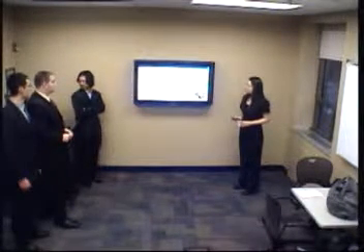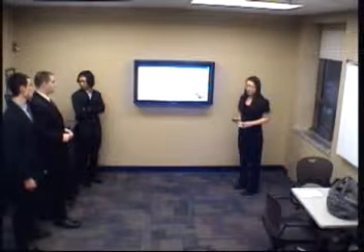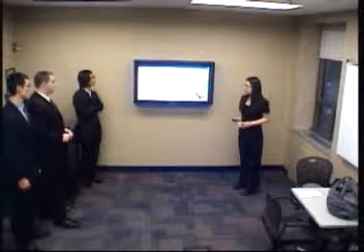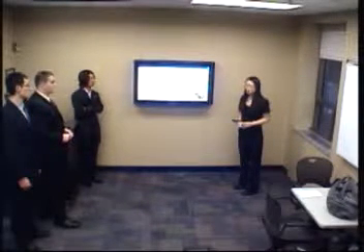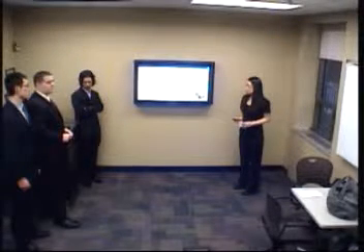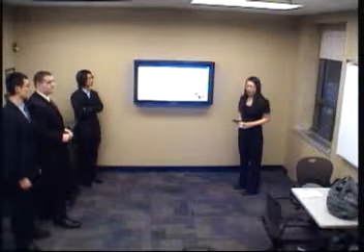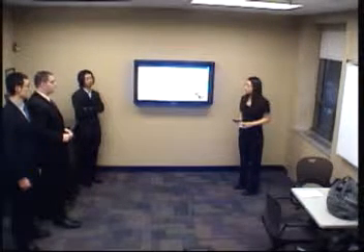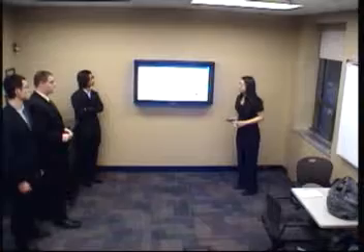The last one is the consistency of the client's needs. Since the duration of our project is 3 months, the client might change her mind and add some extra requirements to this project. The plan for this is to keep good communication with our client and keep our plan updated as soon as possible. Now I will pass to Tim.